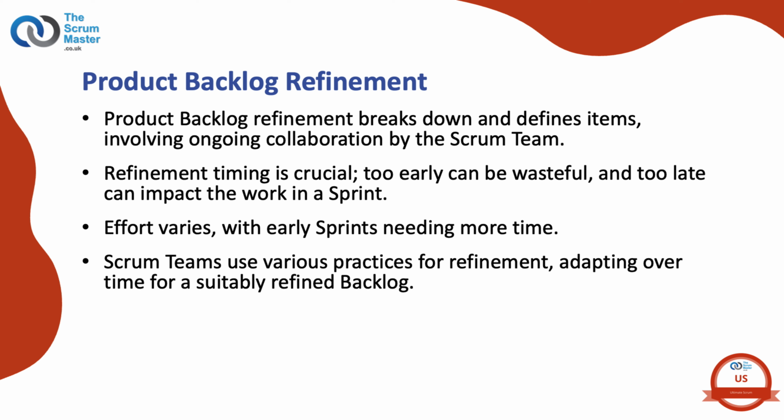The product owner is accountable for effective product backlog management. Refinement is a critical activity enabling this. The Scrum team decides how and when refinement is carried out. It is typical for some time to be spent on refinement in every sprint. If product backlog items are sized as part of refinement, then this will be the responsibility of the developers. The product owner may influence the developers by helping them understand and select trade-offs.